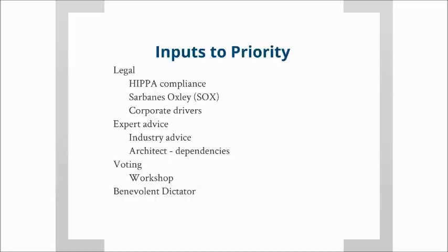So you might ask, why do we not want to do that? Well, the reason is because things change. Requirements, if you take that piece of code and you build it, you can't test it entirely. You can't, at least you can't do an end-to-end or integration test on it, because you don't have that interface built.